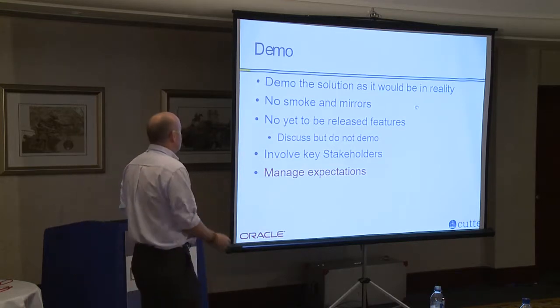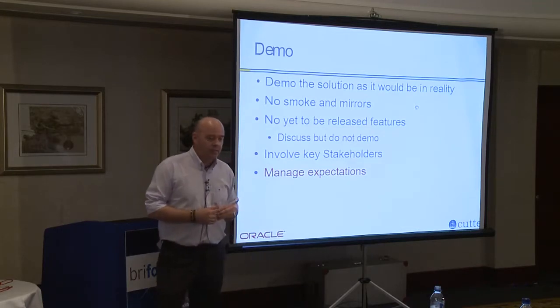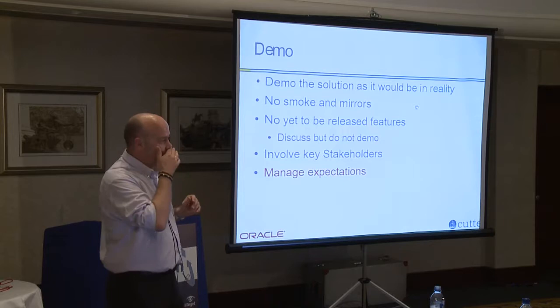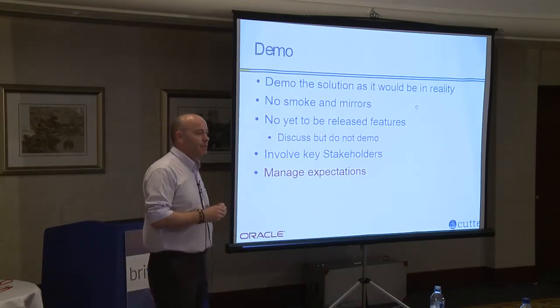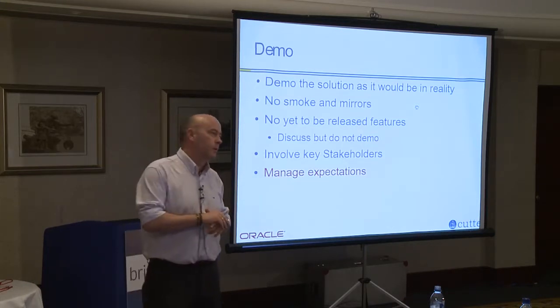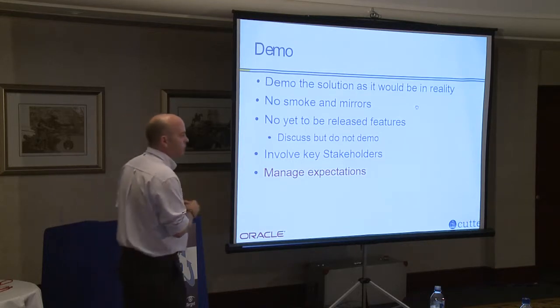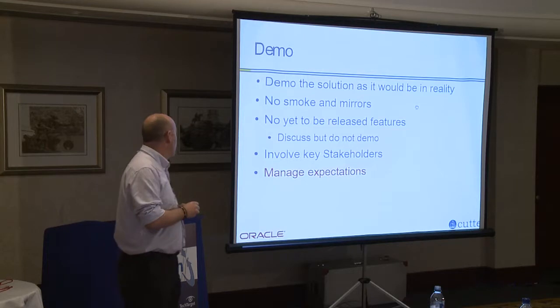Demo the solution. Again, we've seen this, and I'm sure you guys see it at trade shows and tech shows. The solution's demoed, and it's fantastic. It's all bells and whistles, and it's actually all smoke and mirrors sat in the background. Demo it as you're expecting it to be seen by the customer in real-world deployment. As I say, this is all about expectation management. Don't stoke the fire by giving them something that actually is not going to be real in production.